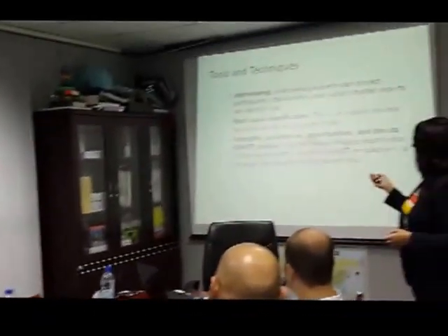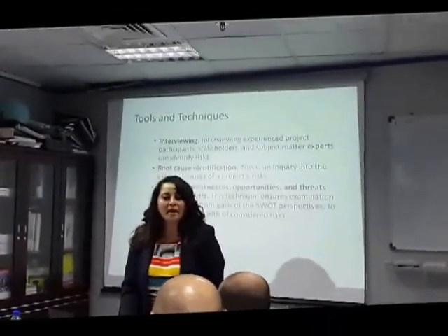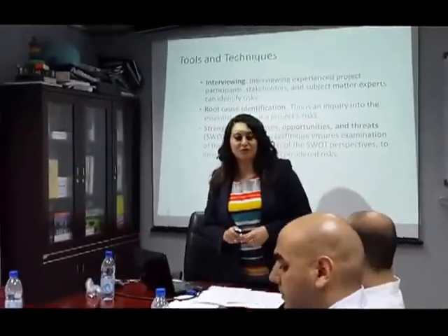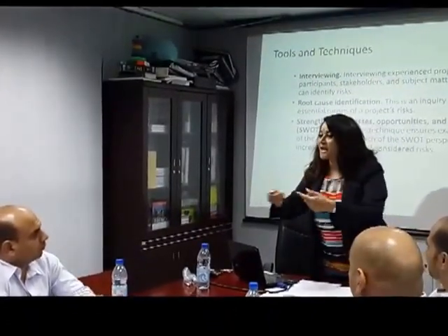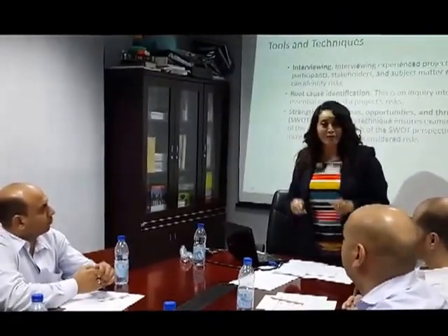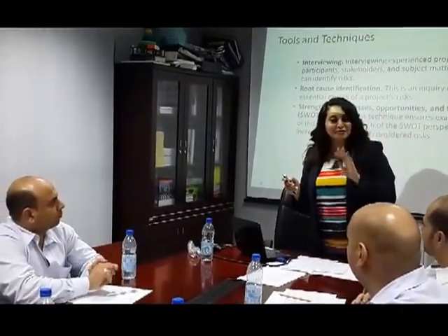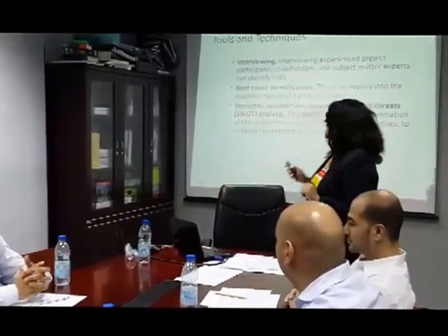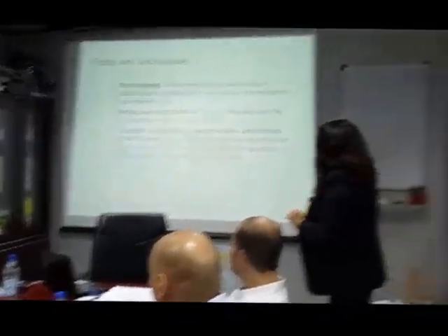Now, while interviewing, I could apply the root cause identification. For example, I would say, okay, what is the risk? The risk is A. Why is this risk going to happen? They would give me the answer. I would say, why? But why? Why? Again and again and again. Now, on average, after 5 whys, I would really get to the root cause of the risk. Okay? So this is another method, another tool and technique, which is the root cause identification.